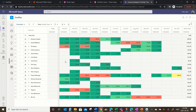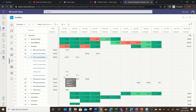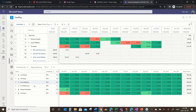The resource manager role will look at this through a much broader lens — this is everything going on in the organization. We saw earlier that the developer was quite heavy. We've added the capability for the resource manager to see what actual tasks people have been assigned to. Depending on what level of depth has been defined, they can say, wait, maybe someone else with availability could do that particular task instead of who I originally planned. For a resource manager, it gives an all-up view of all the different demands coming at us, where people have been deployed, where we have conflicts, and helps identify what options we might have.